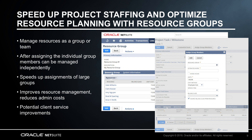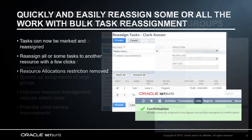Many service organizations operate with groups or teams of people working regularly together on projects and tasks, such as within a production studio. These groups vary in size, but once a team expands past five or six users, assigning those resources to project tasks can be quite cumbersome, especially if there are multiple tasks to which they can be assigned. Project managers can use resource groups on project tasks to make the management of resources more effective. Resource groups can be staffed in one of two ways, dividing the hours or keeping the hours constant. For example, for a task planned to take 30 hours with five members in the group, you can either assign all five members for 30 hours each, or divide the 30 hours among them, giving each of them six hours. This feature is ideal for design or video production studios within an advertising agency or creative firm.